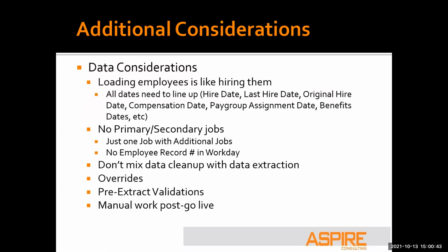When it comes to the actual data, one thing I'll point out real quick is that when you're taking Joe from PeopleSoft and putting him into Workday, you are hiring him in Workday. It is not, generally speaking, in fact in all the cases that I've been in, you're not pulling in Joe's history. You are starting him brand new in Workday. So dates are usually a battle. Does your hire date line up with your position start date? Does it line up with your original hire date? Does it line up with the compensation date? All those dates can be out of sync in Workday's eyes compared to your PeopleSoft environment.